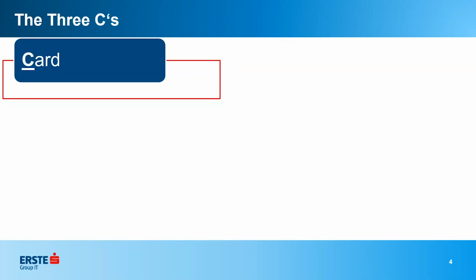Okay, so how do we know when a user story is written and ready to be pulled into a sprint? You have the three C's. The card is the first thing. Typically, these were written on index cards or post-it notes. We enter them typically here in Jira. However you want to document your user story, that's basically the card. Whether you use post-it notes or enter it in Jira or whatever, it's basically documented somewhere.